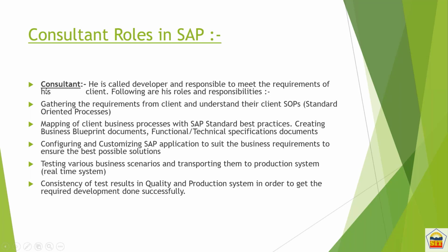and along with it we will be writing the functional specification document, the technical specification document, and also the configuration document, which will guide us down the line if the consultant has been changed. So when the new consultant has come, by going through that configuration document, he would be able to understand, relate, and if any change is to be done, anything particular to that process, if something is to be delivered, he would be able to do it.